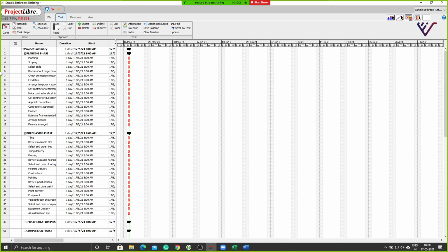Okay, so as of now, Venu sir, this duration is only in days, or can we make it on an hour basis also? It can be made in hours as well. We will come to that when we are looking at calendars. So we can make a 24-hour schedule, an 8-hour per day schedule or 7-hour per day schedule, or we can make weekend working also. There are different ways in which you can tweak your calendar based on which your duration will work.